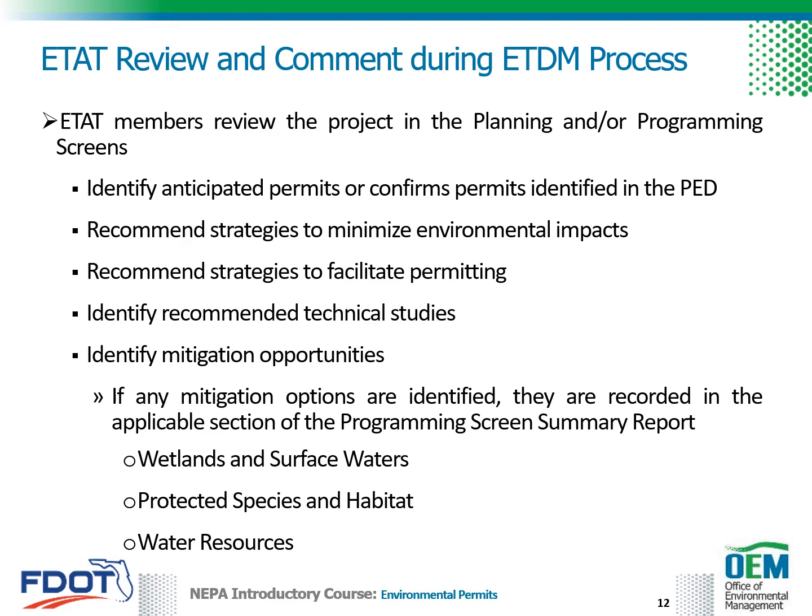For the permit coordinator, the summary report will identify the level of agency coordination anticipated during PD&E, such as formal or informal Section 7 Endangered Species Act consultation for listed species, and what issues the permit coordinator should track during the PD&E in preparation for permitting.